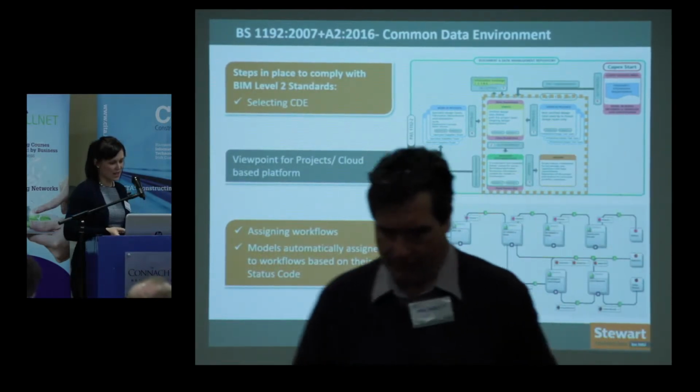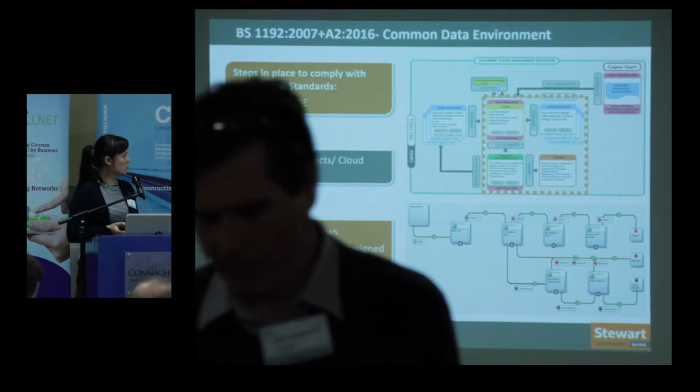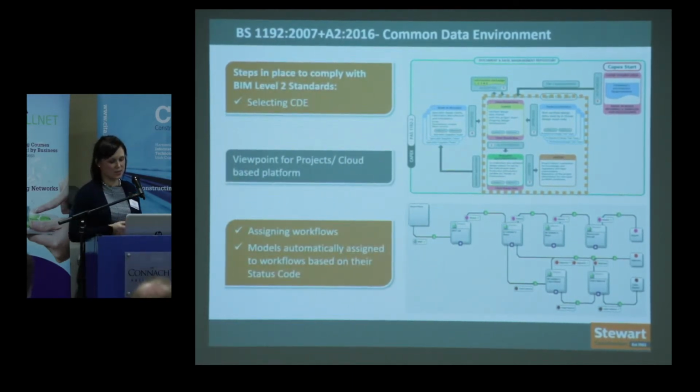to look elsewhere, and we found Viewpoint for Projects to be BIM level 2 compliant. But what we didn't know at the time was that you don't get a ready-to-use product. You do have to build all the CDE yourself, and basically create those workflows and assign them correctly.